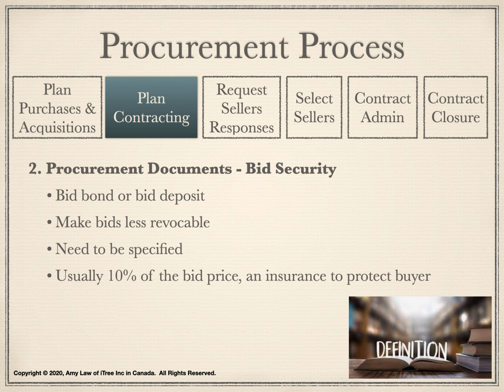Bid security is also known as bid bond or bid deposit. It makes bid less capable of being cancelled. It has to be specific. It is usually 10% of the bid price. It is an insurance to protect buyer.